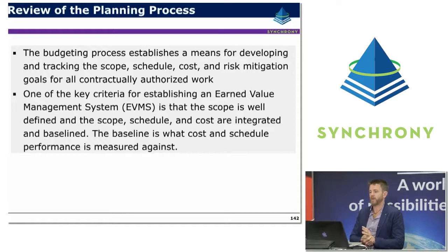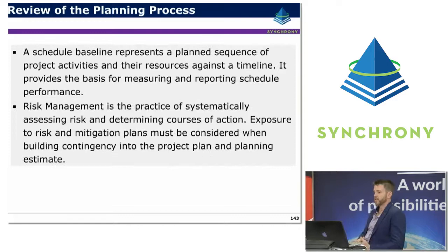But one of the key criteria for establishing an EVMS is that the scope is really well defined and that the schedule and cost are integrated and baselined. So the baseline is what the cost and schedule performance is measured against down the track. The schedule baseline represents the planned sequence of project activities and their resources against a timeline, and it provides the basis for measuring and reporting schedule performance, right? And that schedule baseline is then integrated with the cost information as well.